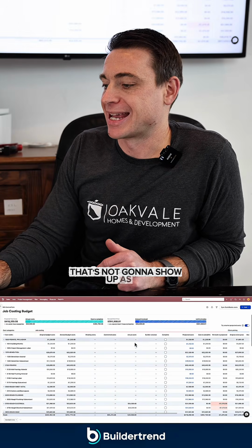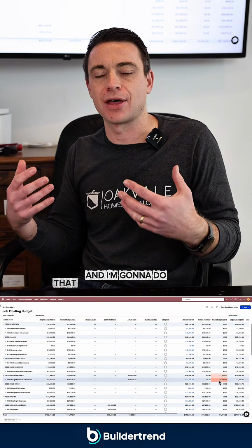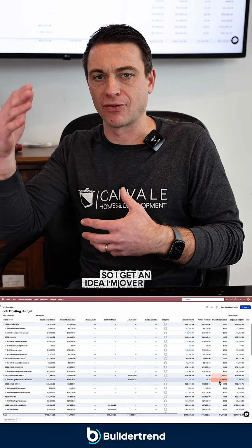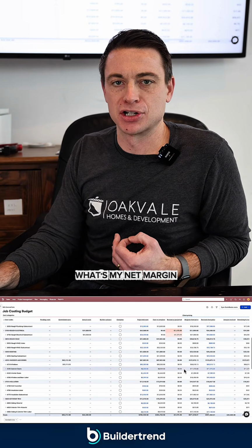So I have a bill that I just created there. That's now going to show up as an actual cost, and it shows me that I'm a little bit over budget there. Okay, and I'm going to do that throughout the project so I get an idea. I'm over here, I'm under there. Ultimately, what's my profitability going to be? What's my net margin going to be as well?